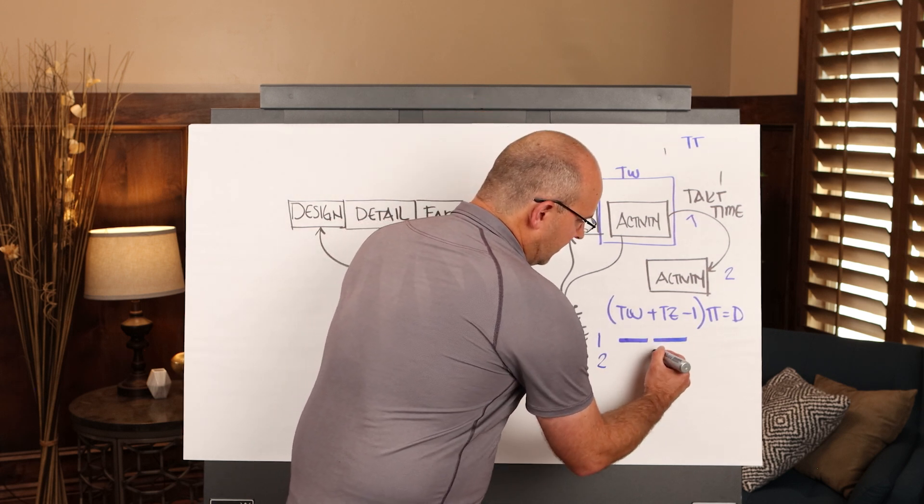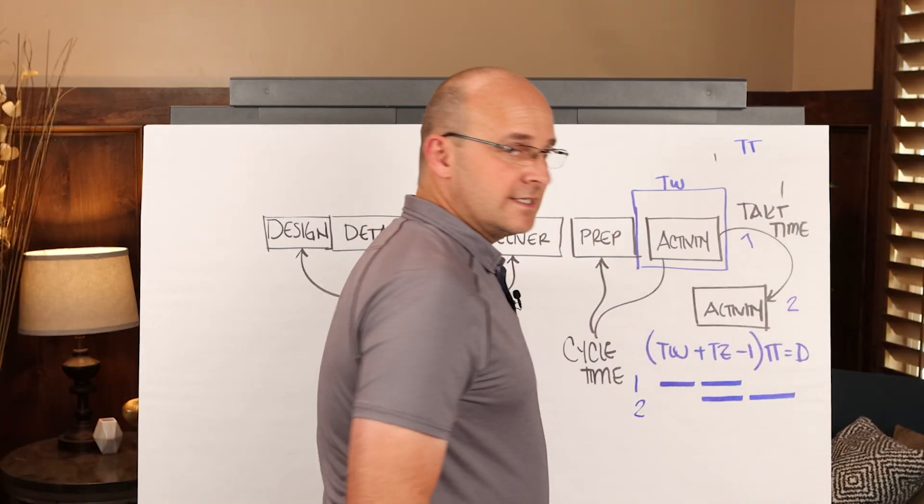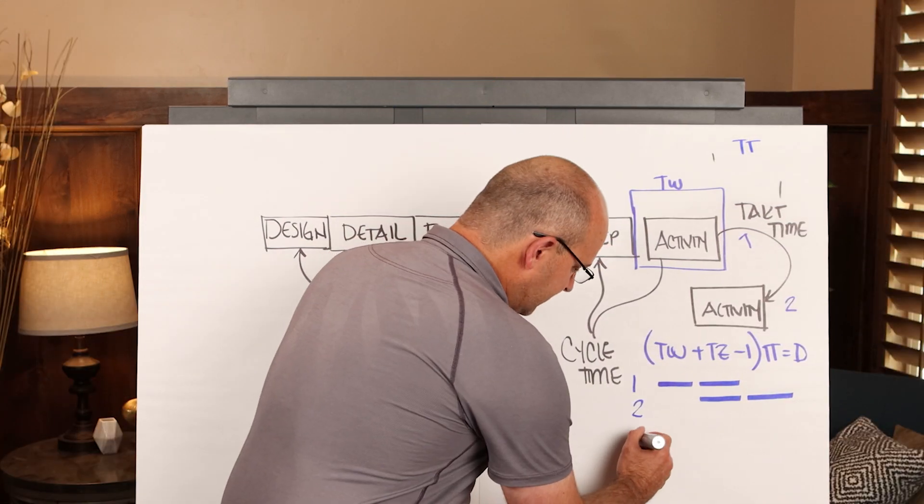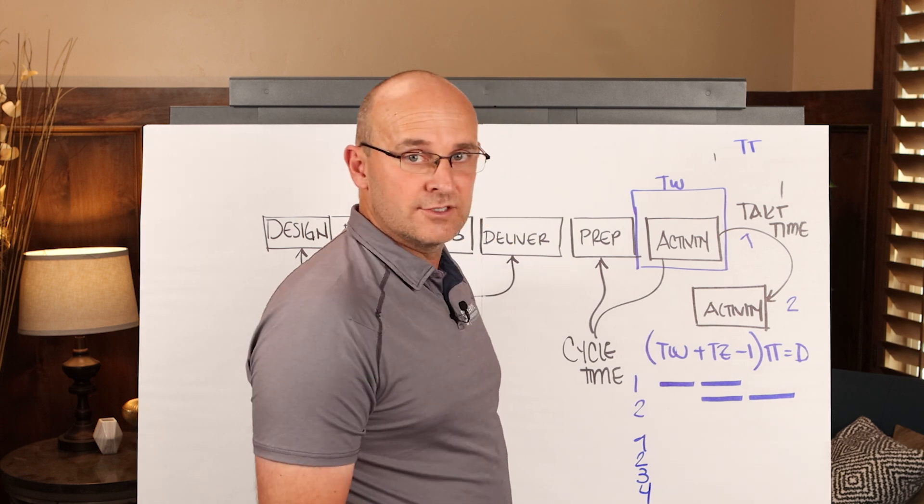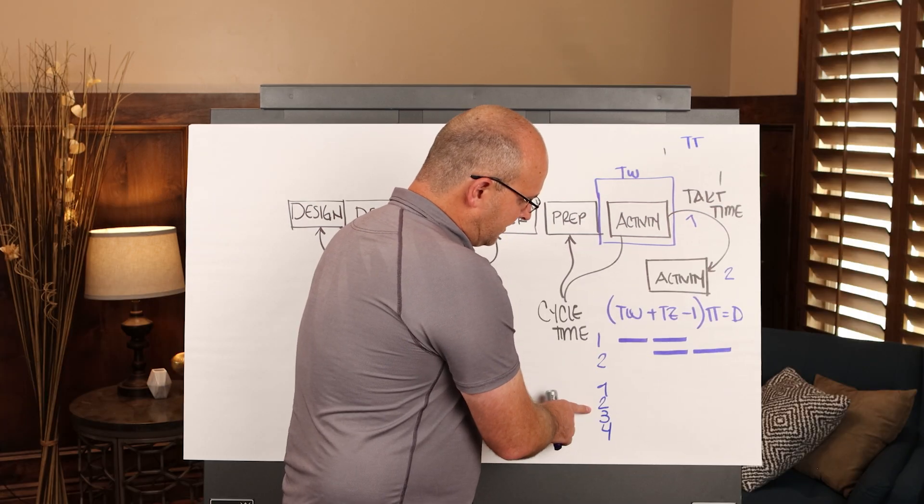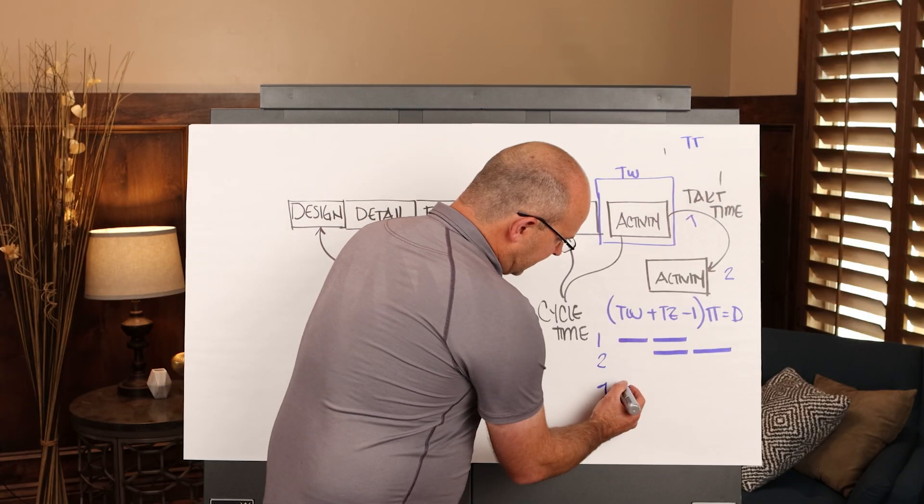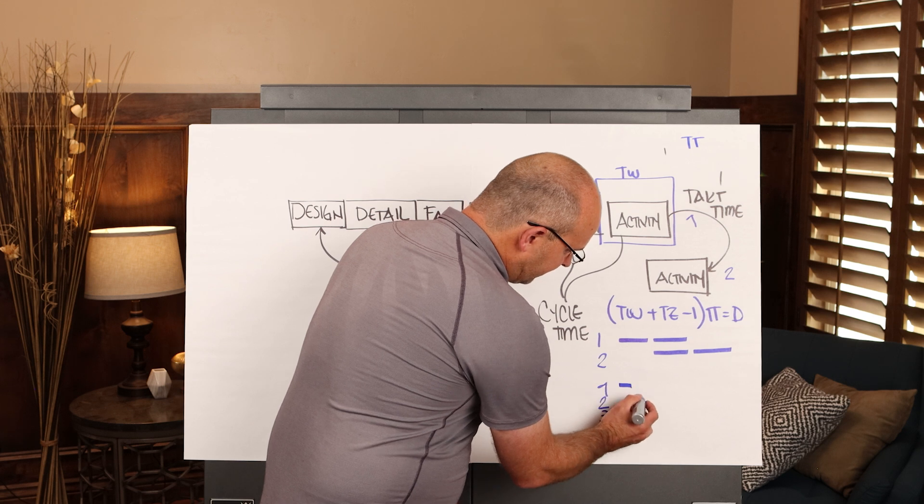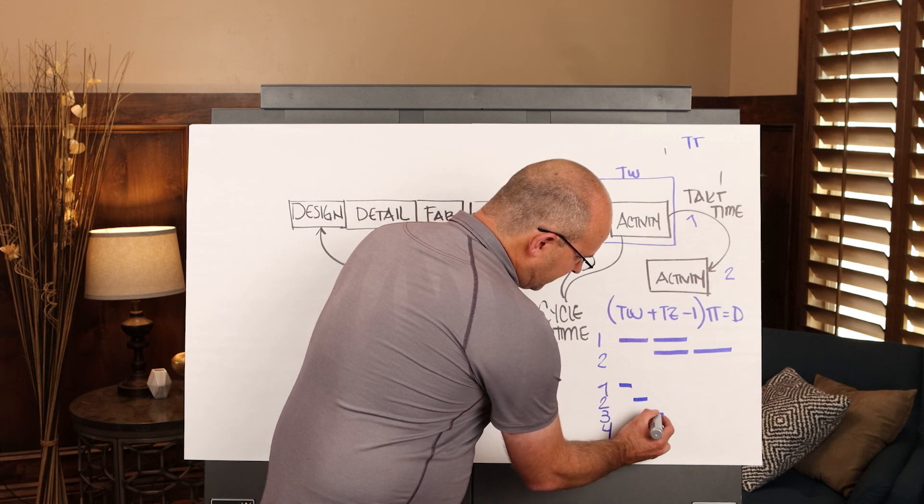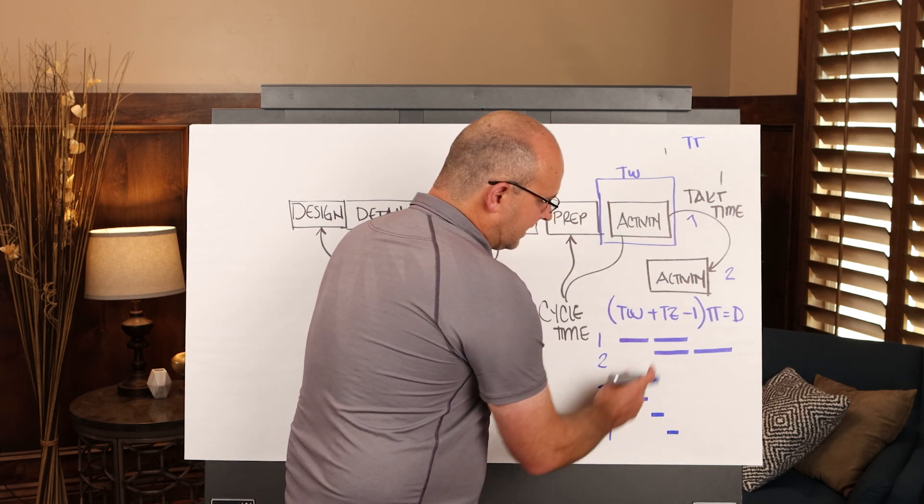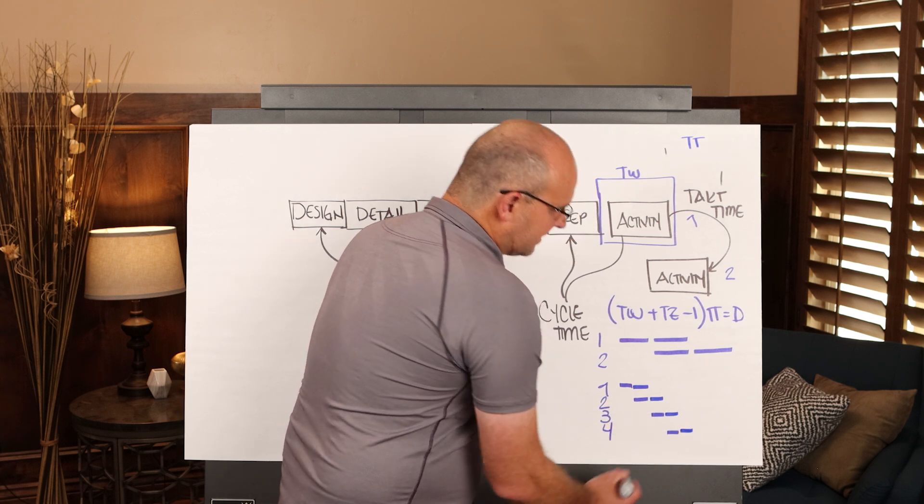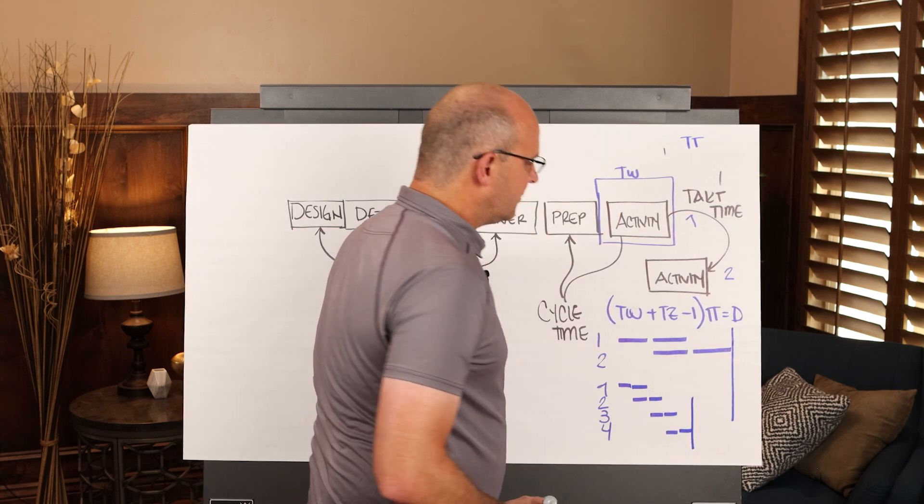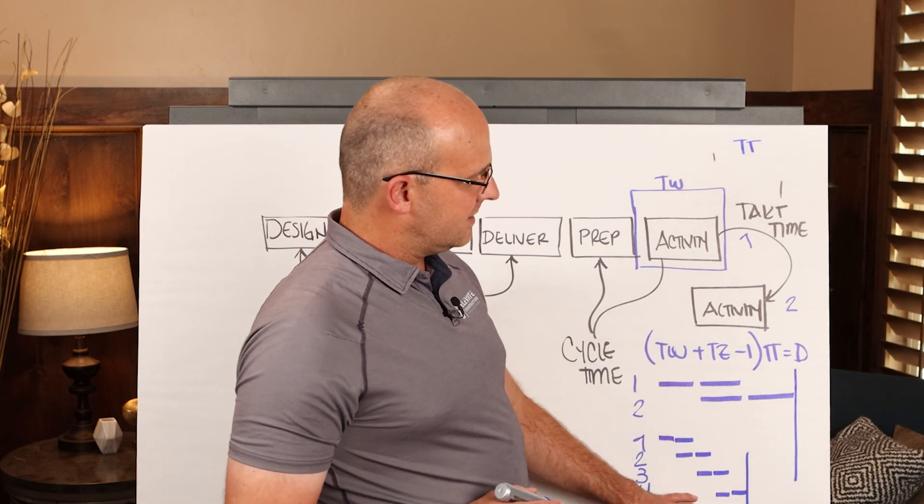And I'll just do this easily, and I've got two activities that I'm analyzing. If I switch to four zones, and yes, I've shown you this in other videos, but it's super important, and I've decreased the zone sizes by half, then this activity here will only be half, right? And the production rhythm will look something like that, and if I bring that second activity down, it will look exactly like that, and you'll see the original end date versus your new end date, these are very, very different.